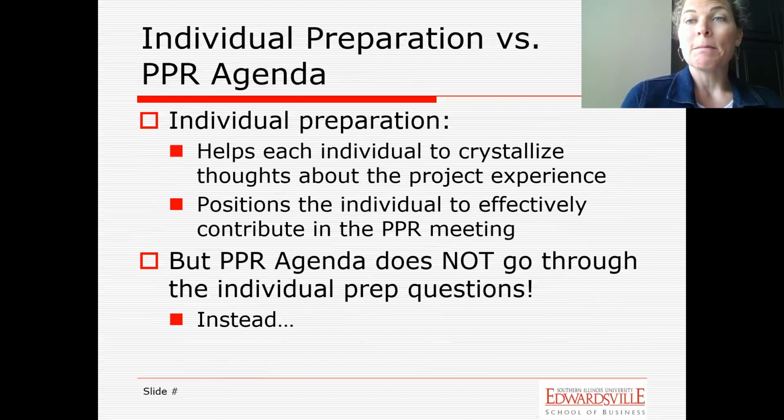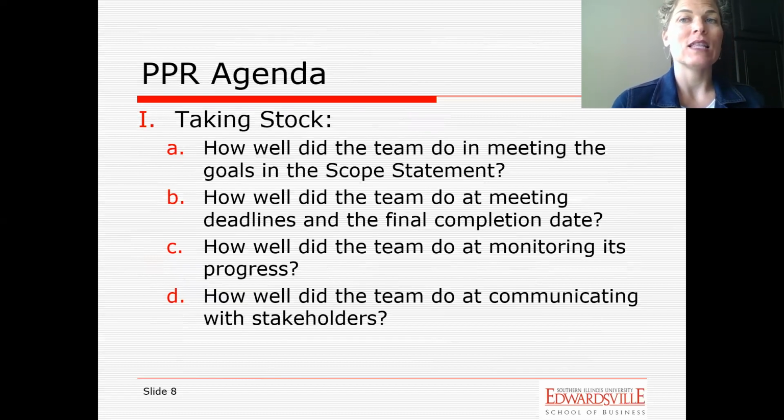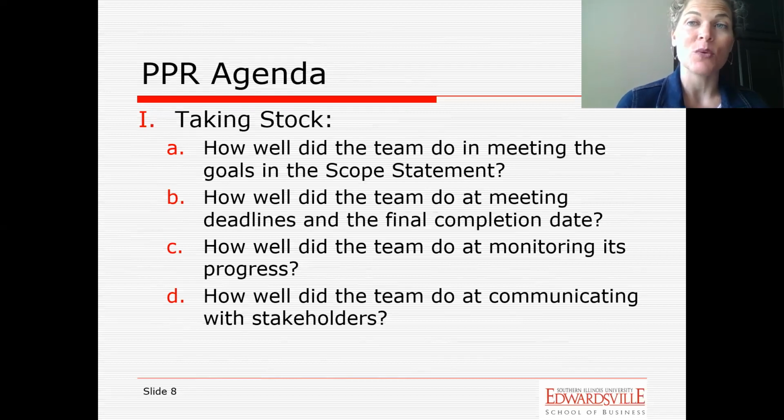Right. The actual meeting, however, will follow this type of an agenda, and you won't necessarily have to do all of these things, but this is the basic idea behind the actual meeting. The first thing on the agenda will be this idea of taking stock. What happened, right? So looking at, did we follow our scope statement? Here's the things that we said that we were going to do in terms of communication plan, our documentation plan, our mission. Did we accomplish those things, or are there things that maybe in the future we would want to change? And so we'll have conversations around some of these types of questions.